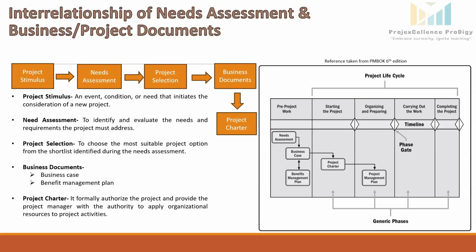This business case we just talked about is a project business document that will be used throughout the project life cycle. It will contain the executive summary, like in our project, the project aims to install a 20 megawatt solar power plant. Then the problem statement would be increasing energy demand and the regulatory pressure to reduce carbon emissions.